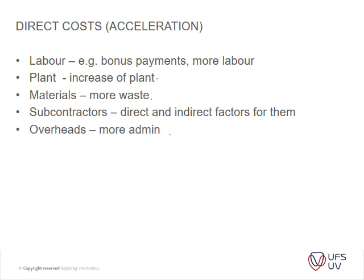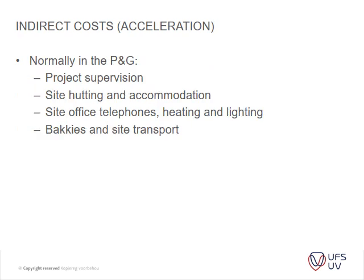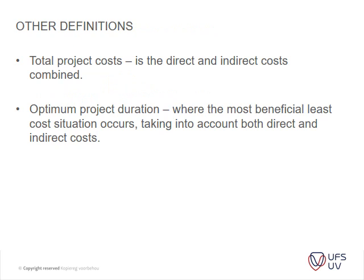Your indirect costs include your normal preliminaries — for instance, project supervision, site huts and accommodation, site office, telephones, heating, transport, and so forth. Your total project cost is the direct and indirect costs combined. The optimum project duration is where the most beneficial, least-cost situation occurs taking both into account.